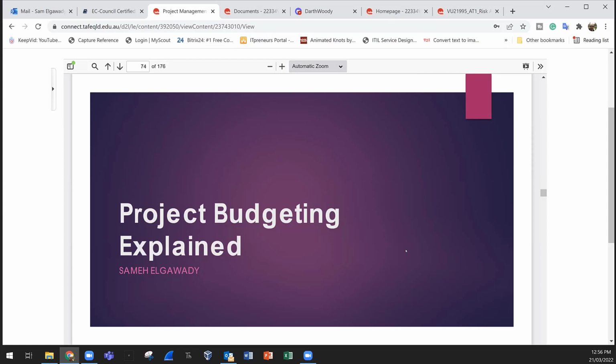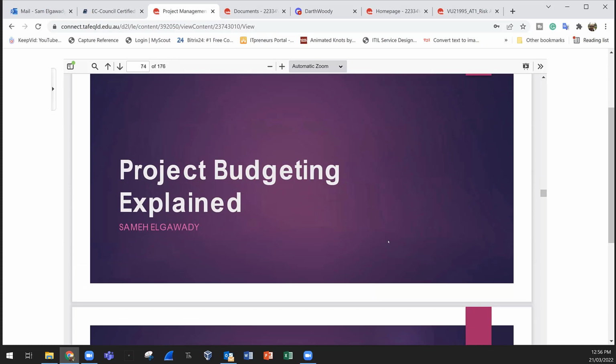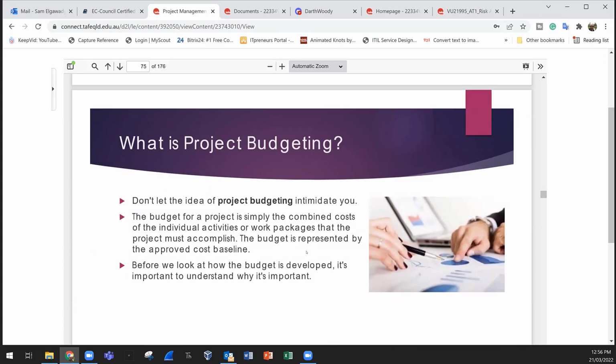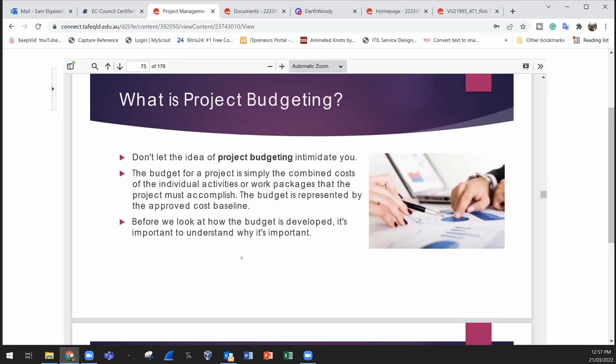Okay, so budget. The budget is an estimation for the future. So from experience, from other SMEs, we can estimate the project budget. So if the project last year cost me 1 million, this year we can calculate that with everything, the prices and everything. So maybe it will cost 1.2 million. So we can estimate the project budget from historical information and records in addition to some updates.